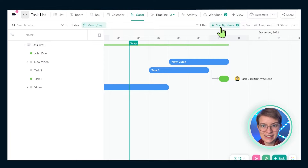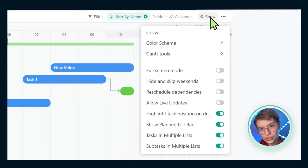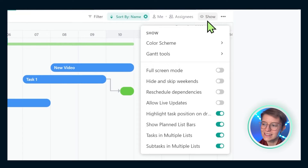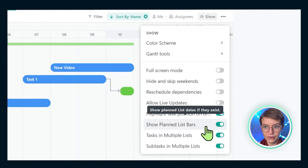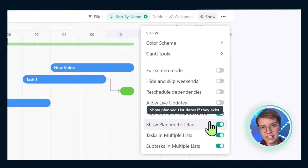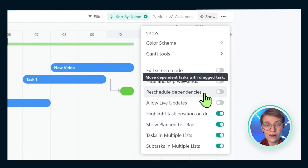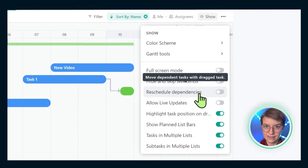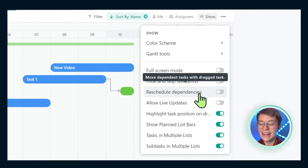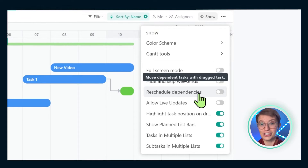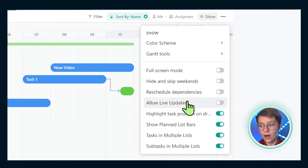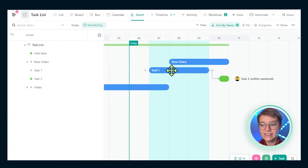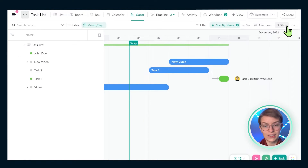Perhaps most importantly in this Gantt view, we have the show menu. The options in here are very different than any other view in ClickUp. This is the only view that exists inside ClickUp that allows us to toggle on or off live updates and toggle on or off reschedule dependencies. If you are someone that's familiar with dependencies, understanding how this view can help you rework those — such as changing a date over time — is a really valuable feature that is unique to this particular view.